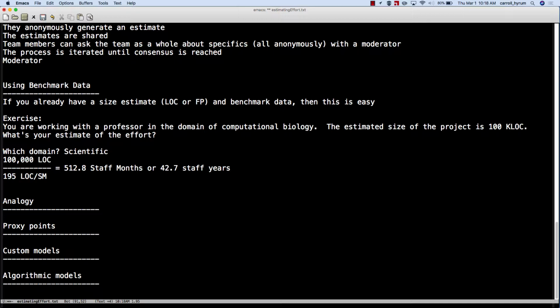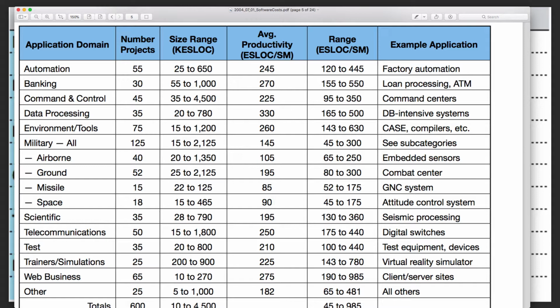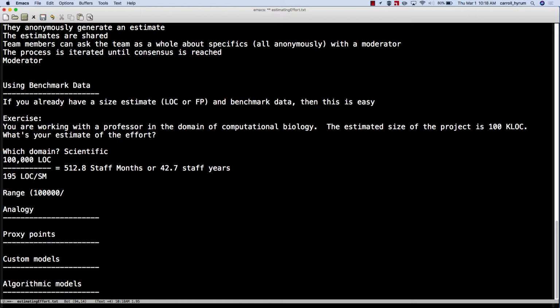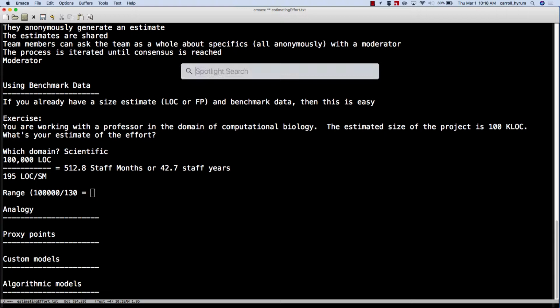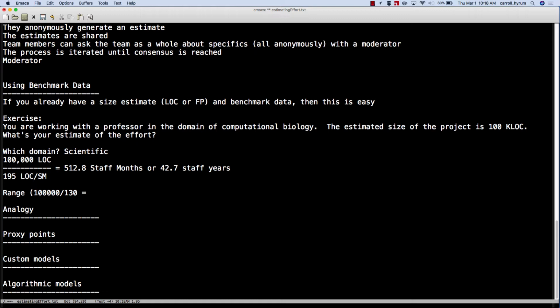Is there any more that goes into this estimate for effort? What we need to acknowledge is that there is a range here based on our benchmark data. We just used the single average here, but the range is 130 to 360. So then the range is 100,000 divided by 130, which is 769.2 staff months,